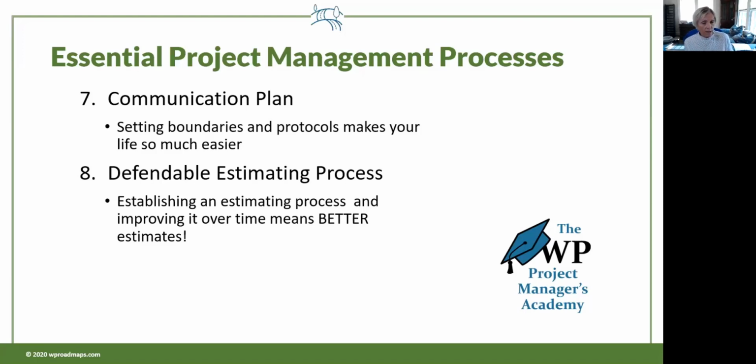So when you waste time or you allow your client to waste your time, you know how much money you just lost by doing that. That is super, super important for keeping you on task. Also, you need that hourly rate to at least establish a baseline estimate. Whether you want to pop that up because of value, that's up to you, but you need to know where your ROI line is. And that's why you need a defendable estimating process.